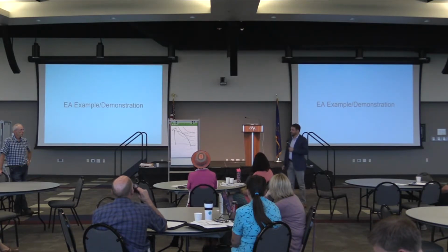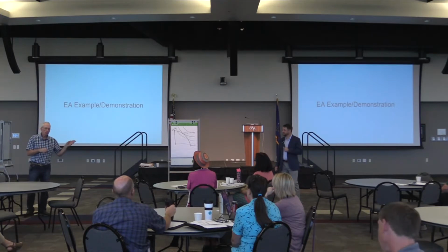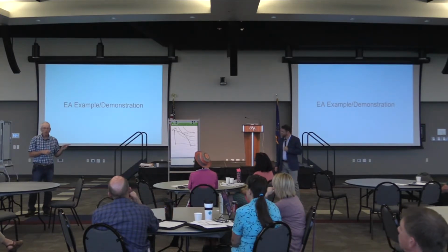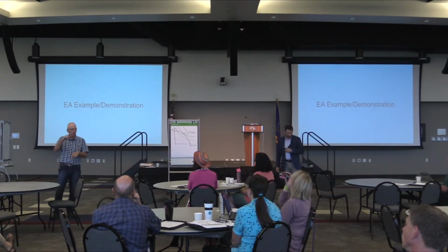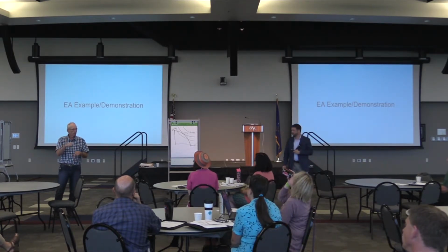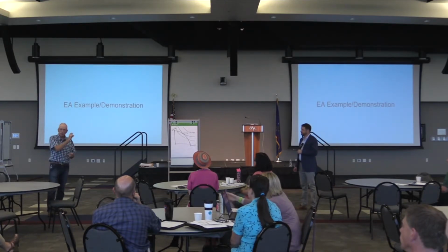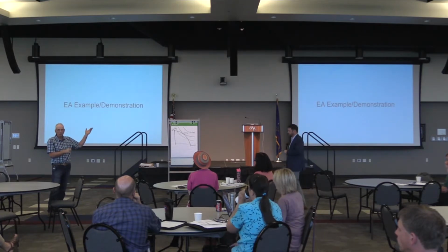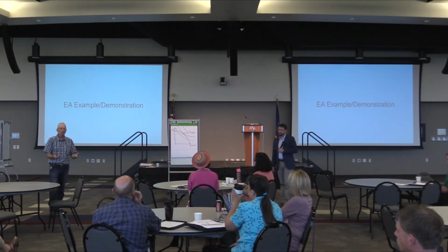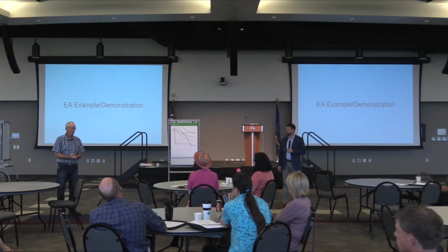And for a lot of these issues that we're talking about, Jeremy mentioned sensitivity analysis. The result isn't very sensitive to changes in some of these assumptions, because by the time you get done discounting it, it's only a small part of the project. You could triple the value and it still isn't going to change the result. So don't spend a lot of time and effort chasing rabbits down a hole that aren't going to make much difference.